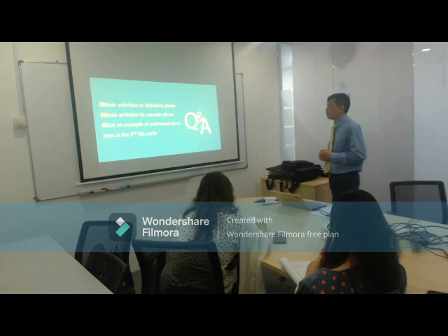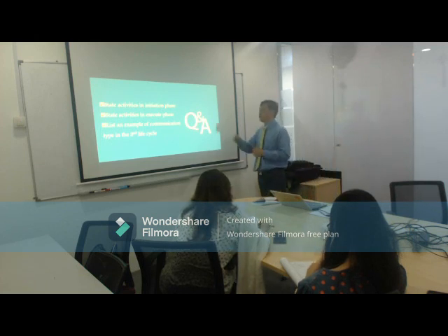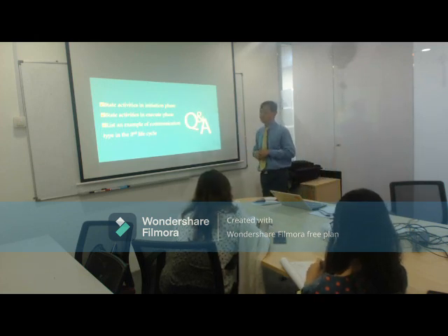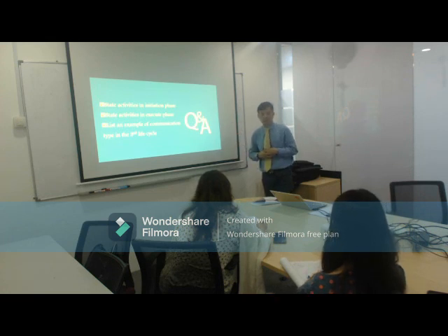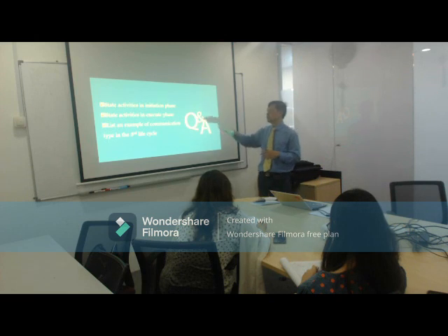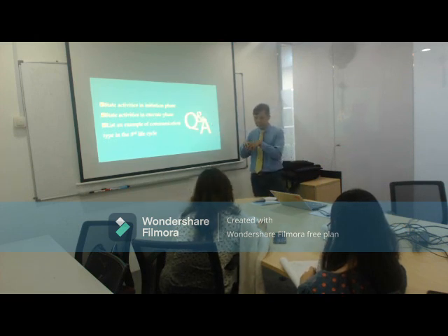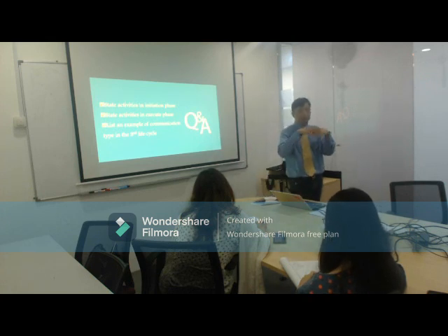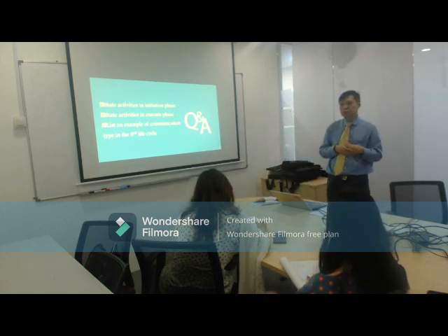In some large organizations, when they execute a phase, it will involve regular weekly meetings with everyone for their updates. Some people, for this portion, will have regular sub-committee meetings. So each sub-committee must have a meeting every week. At the end of the month, they have the meeting with the steering committee.